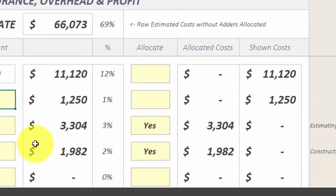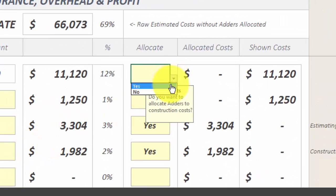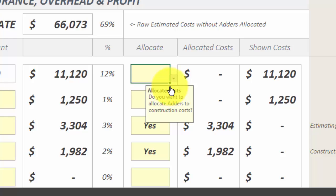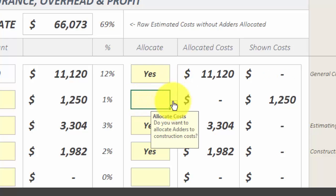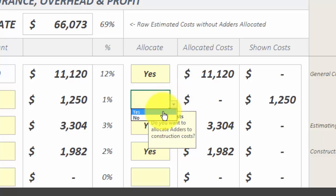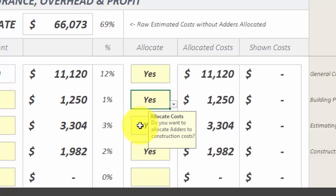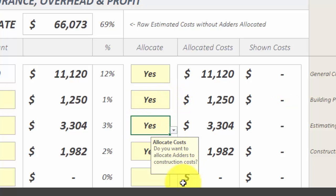You can pick and choose which project soft costs you want to hide or show on your client proposals. These hidden soft costs are allocated and evenly distributed to your raw estimated construction costs and hidden from your client proposals.